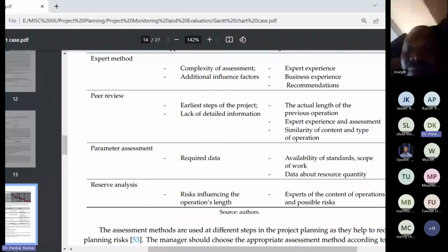We can establish clear criteria and guidelines for the review process. This may include project objectives, quality standards, compliance with project plans, and specific criteria for evaluating the work or deliverable. We can plan when and how often peer reviews will take place. Depending on the project size and complexity, reviews may occur at various stages, such as project initiation, planning, execution, and closure. We can include reviews in the project schedule to allocate time for this important quality control activity.